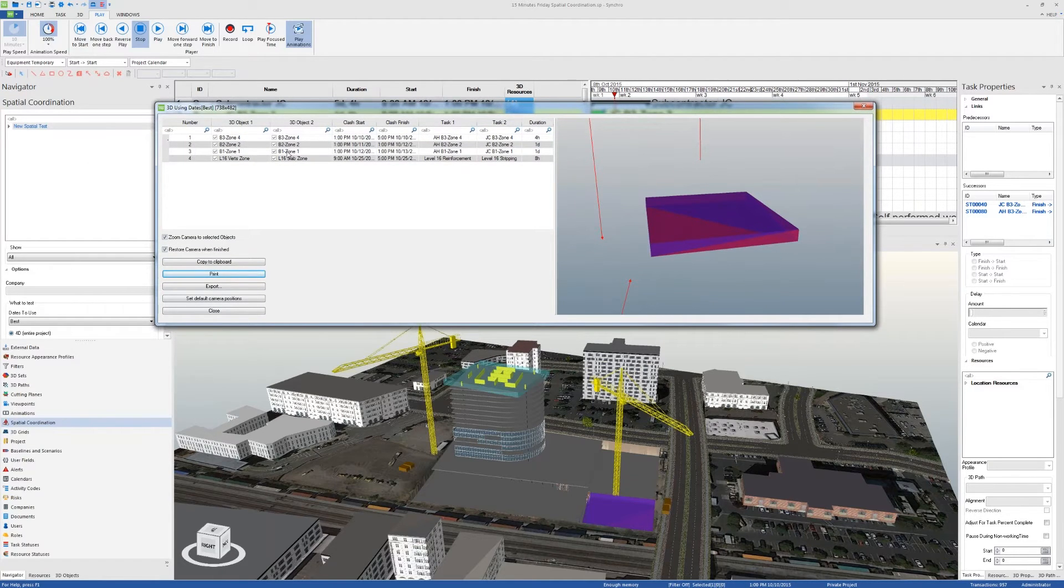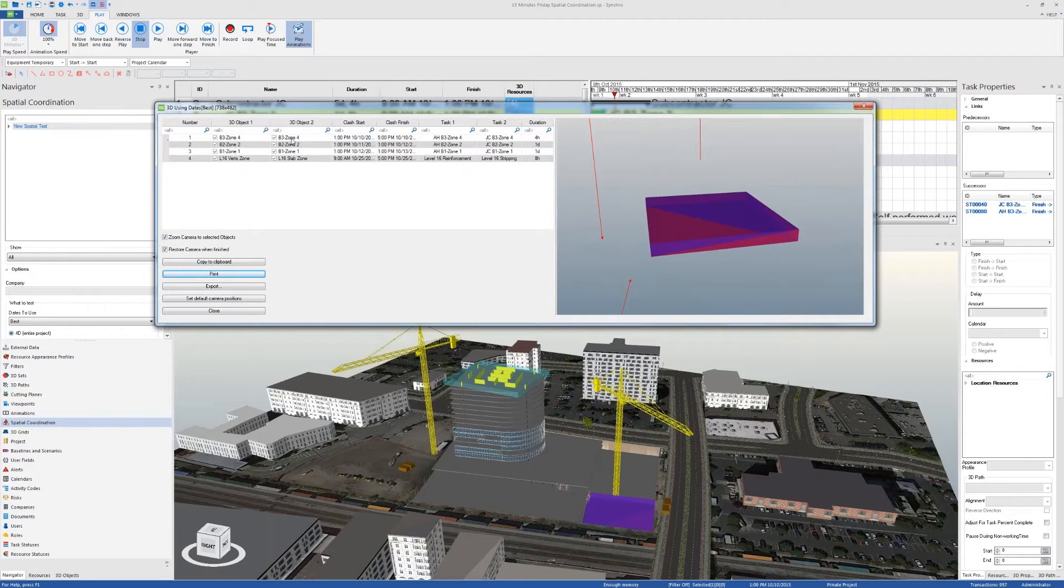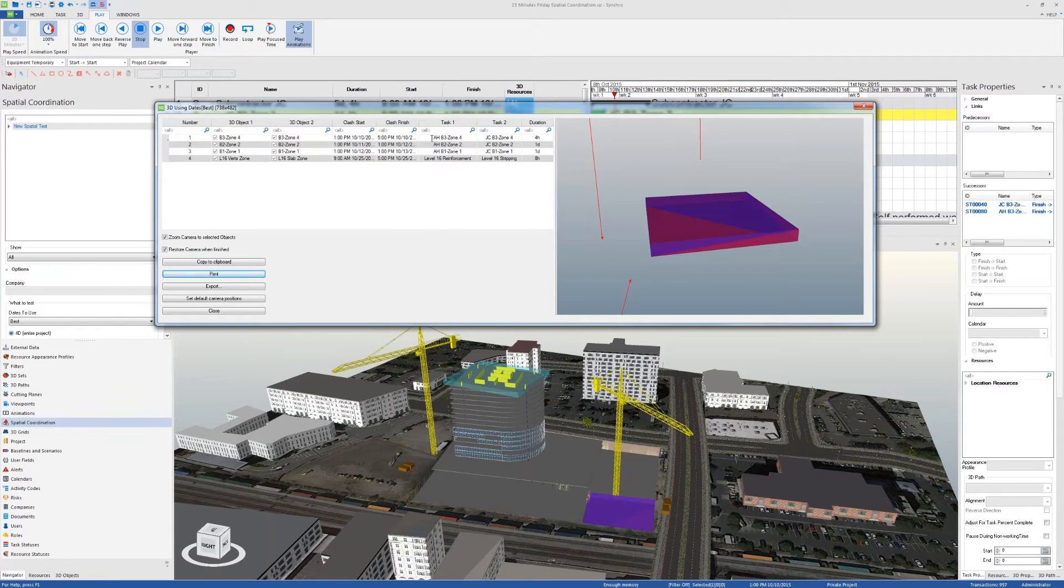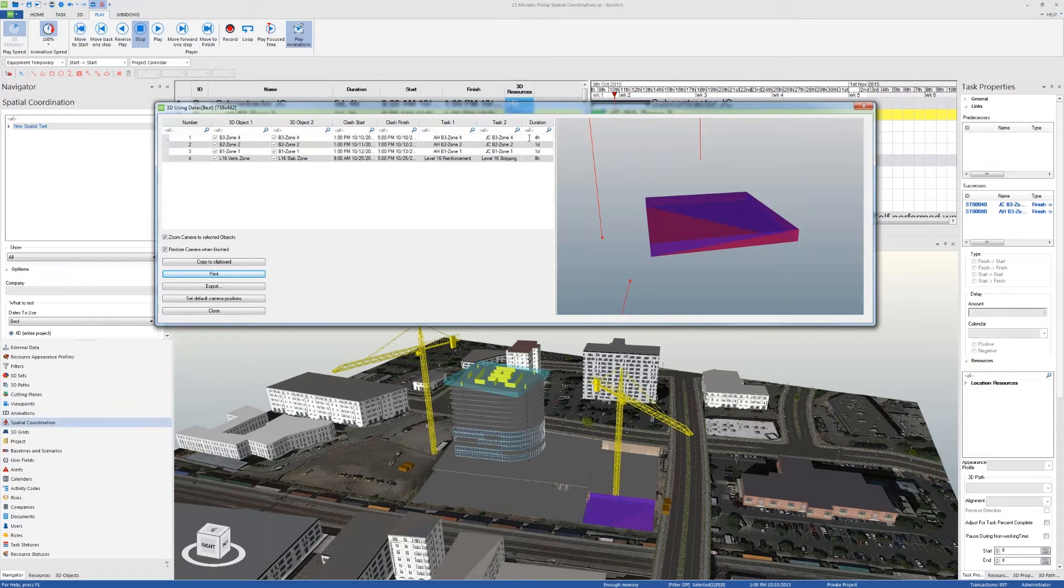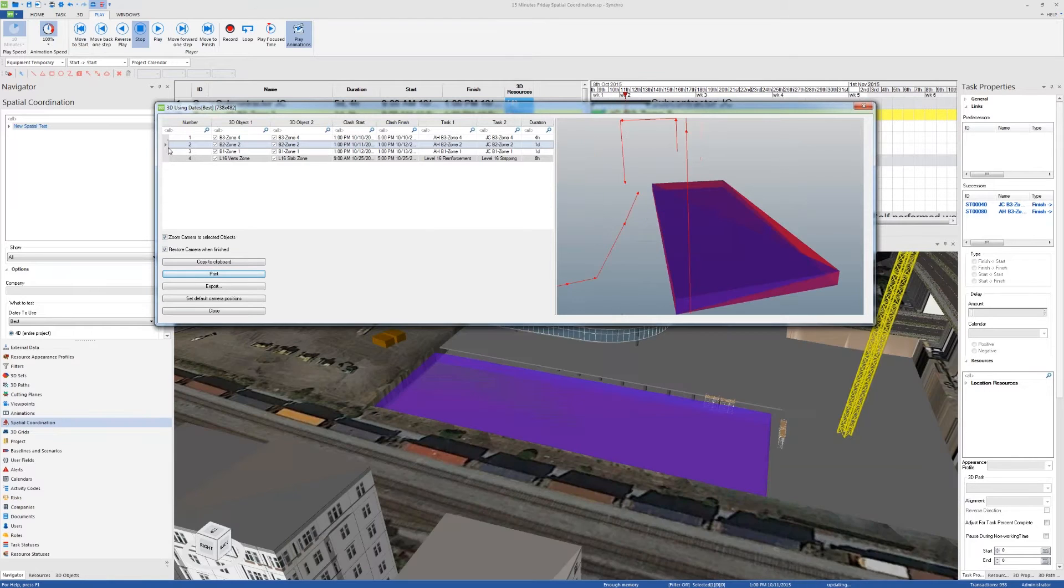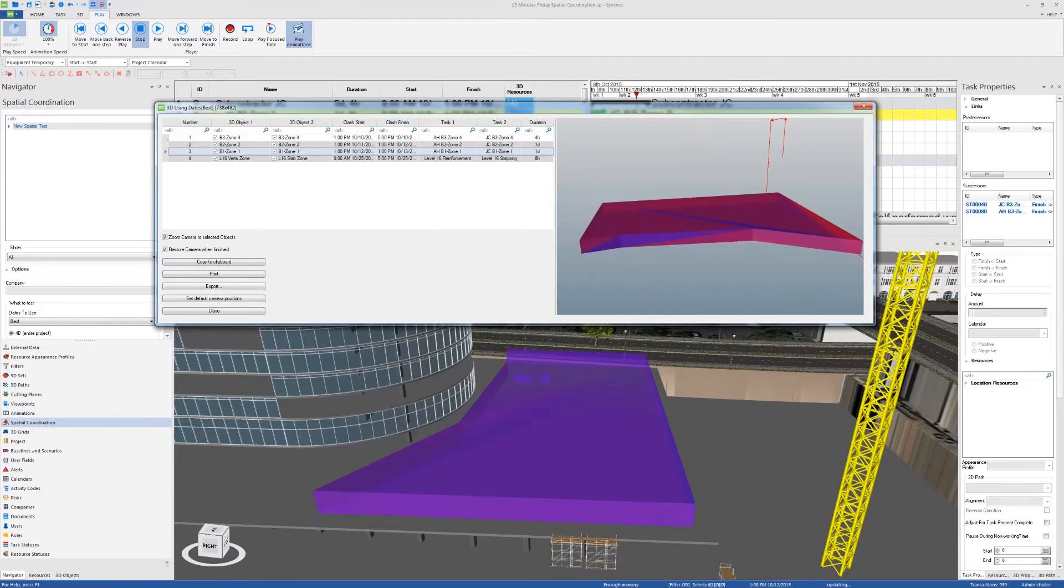The first three clashes we can see here are the same 3D object, which is the same workspace, but with two different trades working at the same time for an overlap of four hours in the first case, one day in the second case, and one day in the third case. I can click on these clashes to show on the project where these clashes are happening.